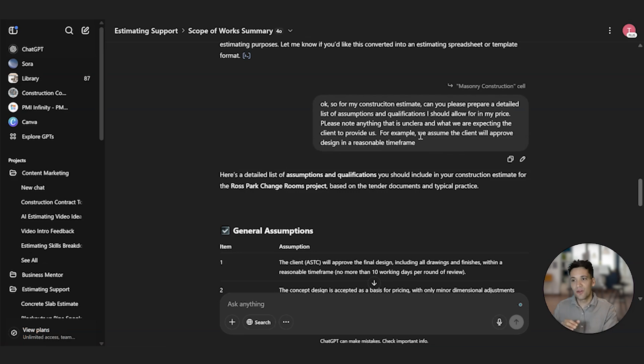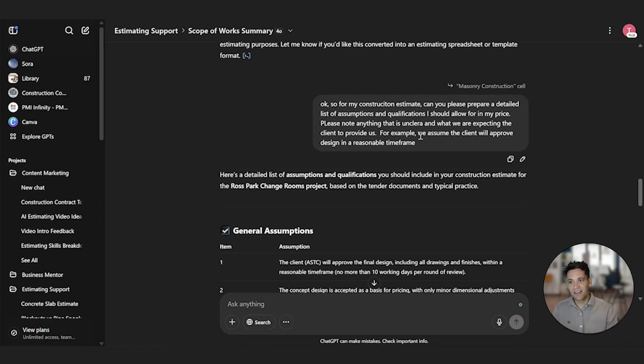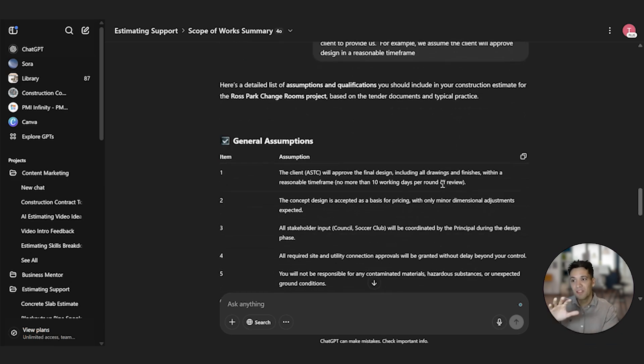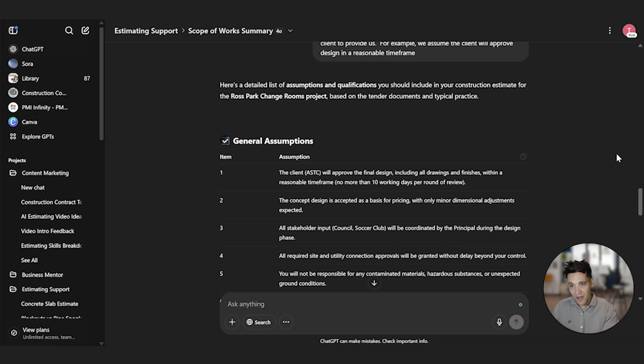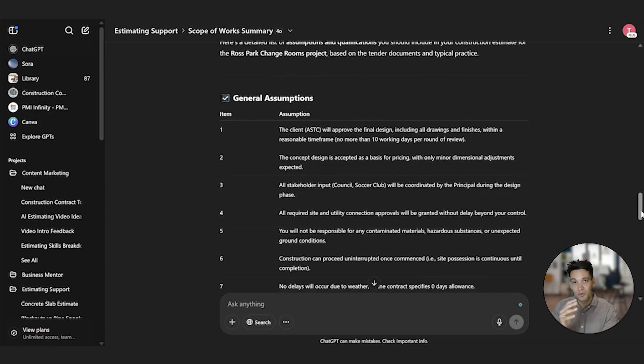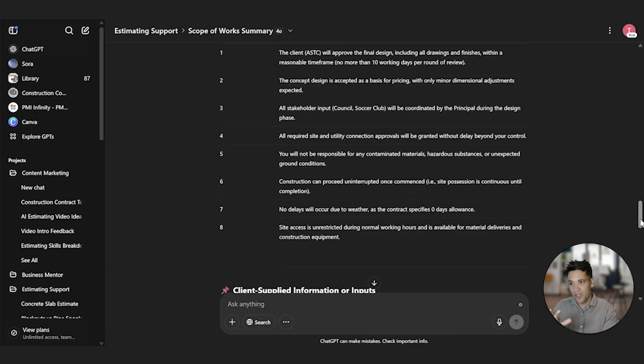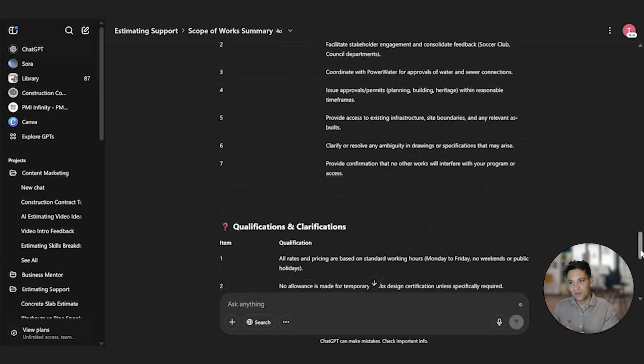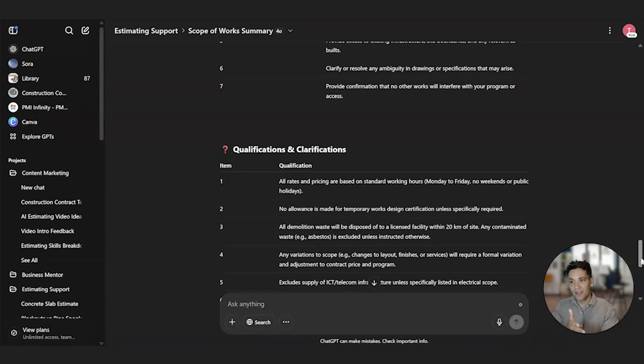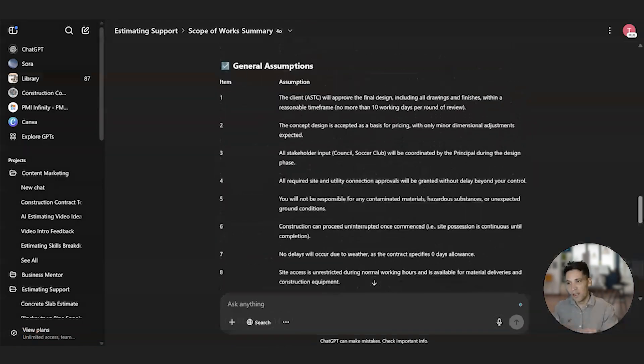So for this example in this building, I haven't actually prepared an estimate. I'm just using this to showcase the types of capabilities that you can use an LLM for. So as an example, I've said to it, okay, so for my construction estimate, can you please prepare a detailed list of assumptions and qualifications I should allow for in my price? Please note anything that is unclear and what we are expecting the client to provide for this. For example, we assume the client will approve our design within a reasonable time range. Now this is great because we can use these assumptions as a basis for our letter of offer when we submit our estimate to the client.